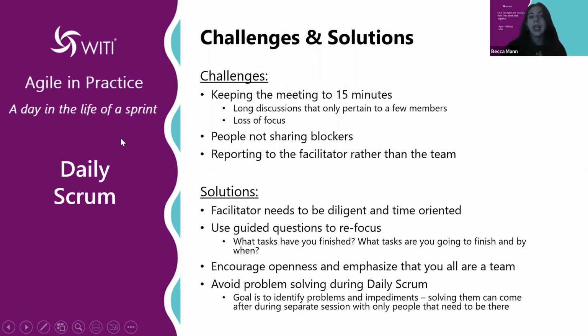And this is due to a myriad of things, but a lot of it is long discussions that only pertain to a few members. So someone came across a bug the other day and they wanted to discuss it, but instead of saying, okay, we are aware of the bug, we know the parties involved, this actually does need to be a meeting, but outside of this, so everyone else can talk about it, it just goes on and on. And that's a huge deal.